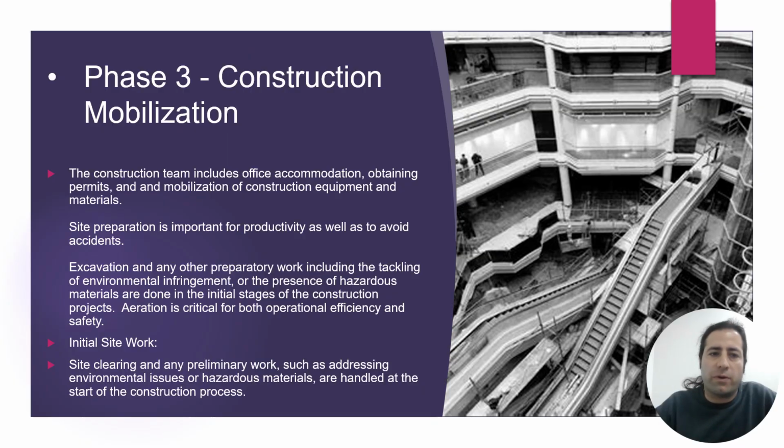Construction mobilization. The construction team sets up office accommodation, obtains permits, and mobilizes construction equipment and materials. Site preparation is important for productivity as well as to avoid accidents. Excavation and any other preparatory work, including tackling environmental issues or hazardous materials, are done at an initial stage of the construction project.